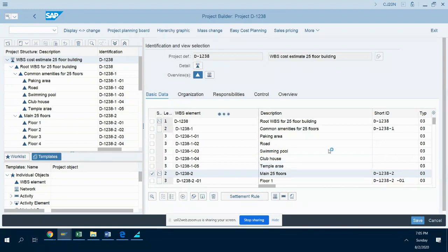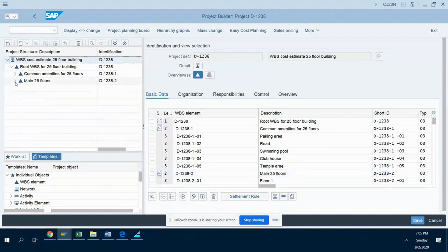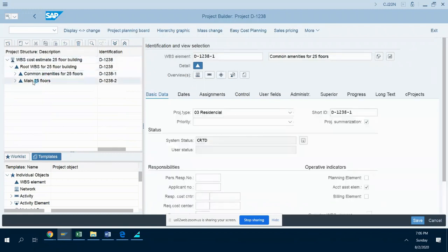So now, these are all common amenities. See that, by the way, a common element is mandatorily something you have to create in each project. Most of the cases, I'm telling you this. Why I am taking this one is so that you will understand better. Like this, for any project or new product development, you plan technically something under one WBS and common things under one WBS.